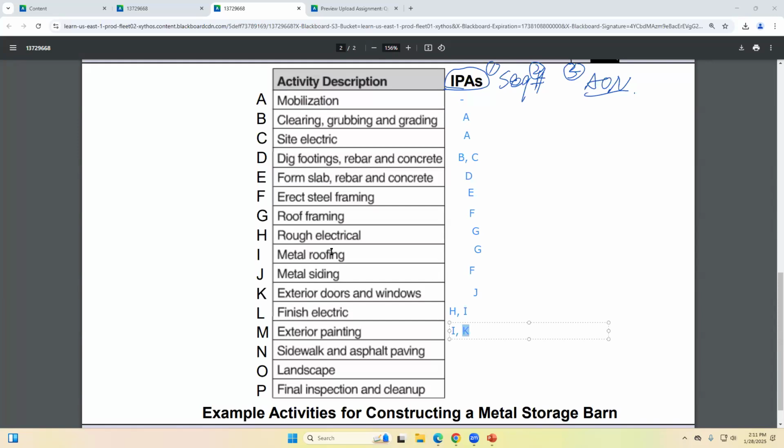You can go to the construction site which is doing residential housing and see how they do the construction process. They already put a roof and door here. They did not put the garage door. They put in the regular entrance door and the windows before they're doing the roofing. Because if you have two stories, you already have your first story covered. Does that make sense? Your rain is only going to your second floor.